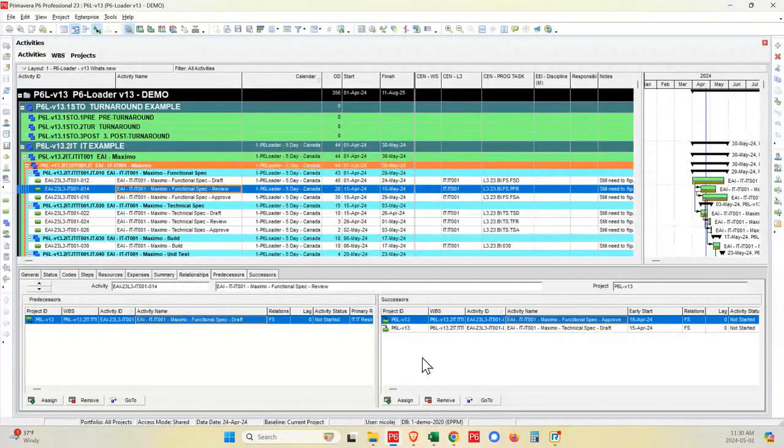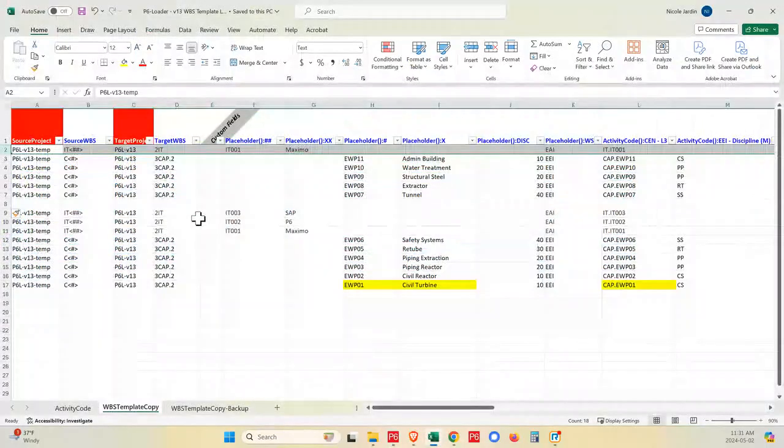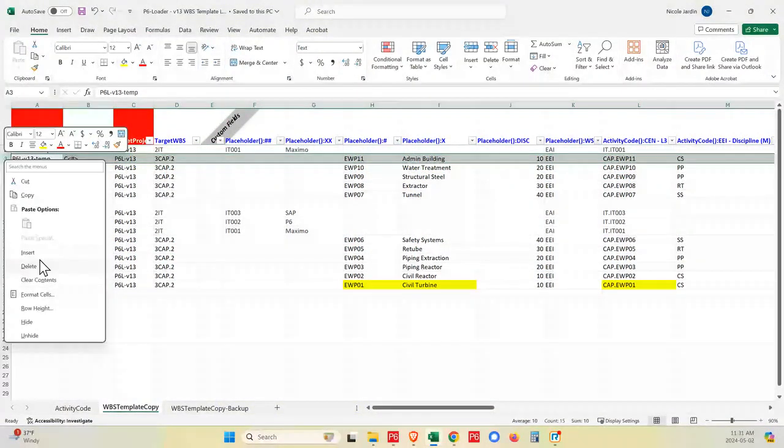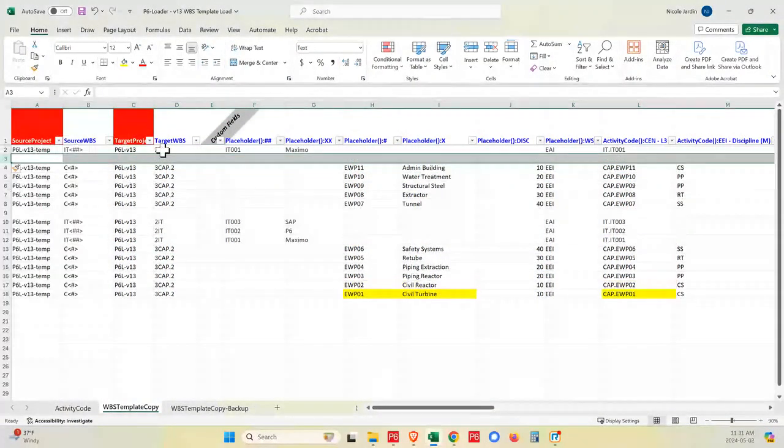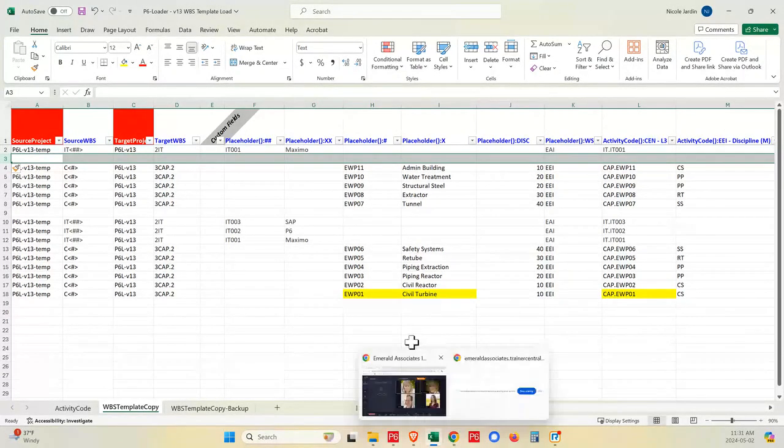So again, you can run it multiple times, and that's the huge benefit here. As you're building out your template, making sure it's working well, you load it just with one, right? So when you're testing out, making sure that it's going to work the way you want, you just load one record. Load it, make sure you like it, load it, make sure you like it, that sort of thing. So it's really easy to get it down pat, and then you get all your data in here.